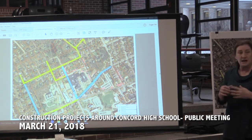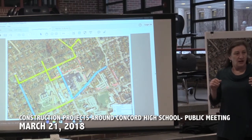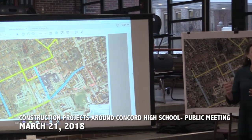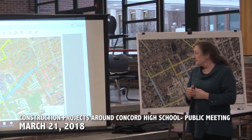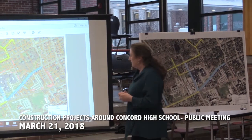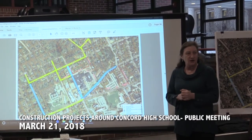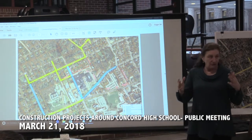Throughout those 3 streets, we will be adding a few additional hydrants. There'll also be some temporary hydrants you may see. Those are put in mostly to assist the fire department if anything happens where they need access to water. During this work, they have a few extra hydrants they can tap off of. Other than that, if everything goes as planned, no one should really be out of water, and we shouldn't see any dirty water at all.